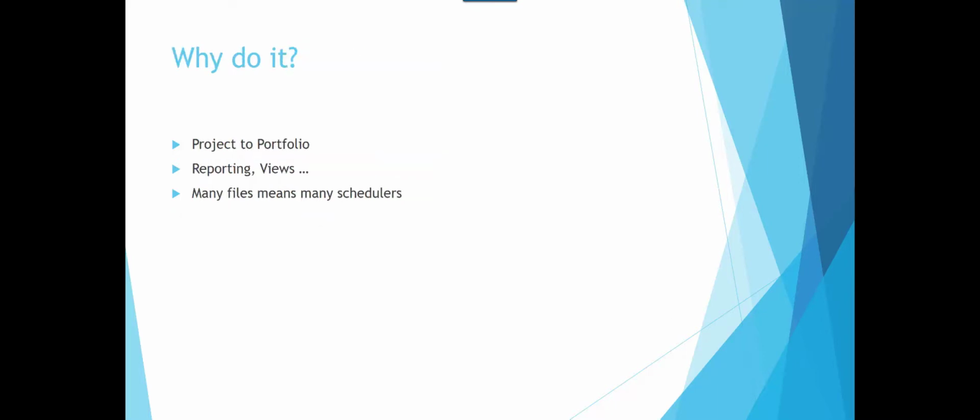Why bother to do it? Well, we can go from different projects all the way to a portfolio presentation with special reports, views that we can customize, filtering based on whatever the needs of our client might be. Many files also means many schedulers. If there are underlying files, we can have several people working and reviewing in those files simultaneously, making updates while the master remains untouched. Then later we can see the effect of all those changes by opening the master file.